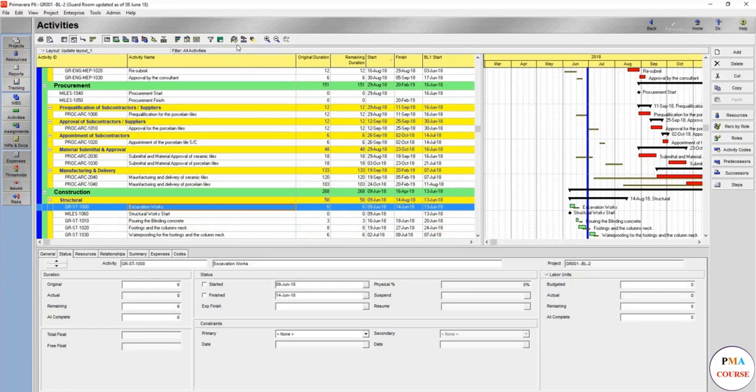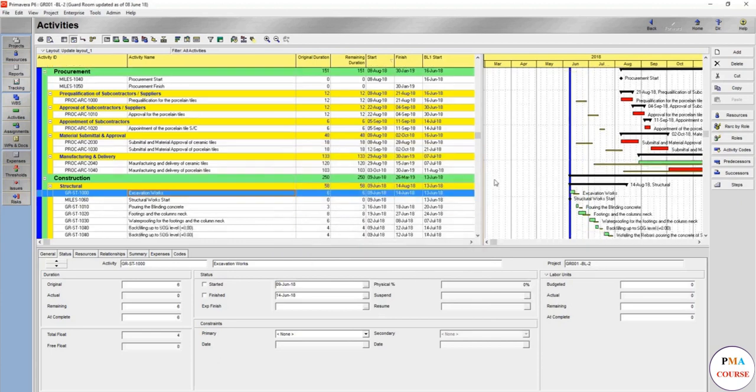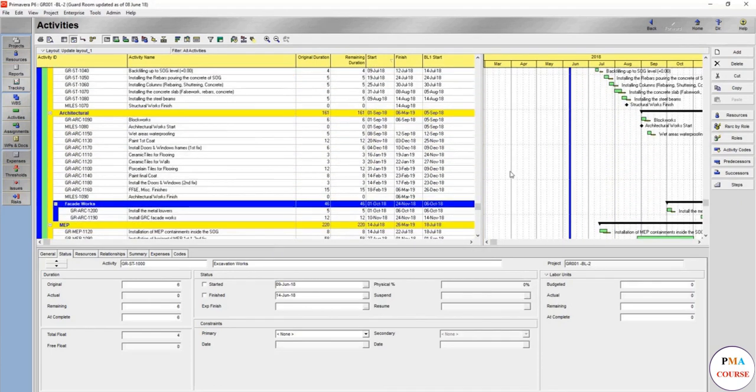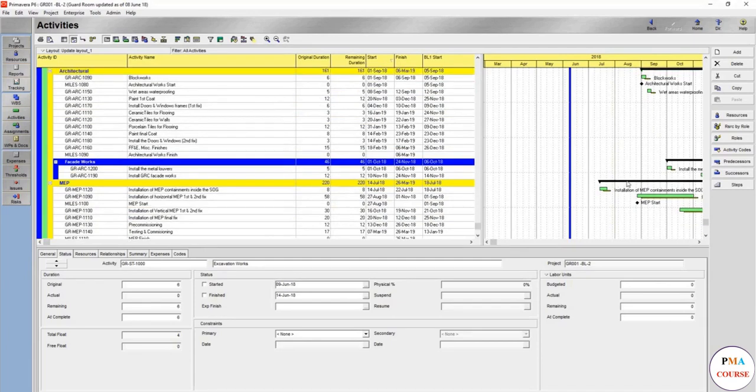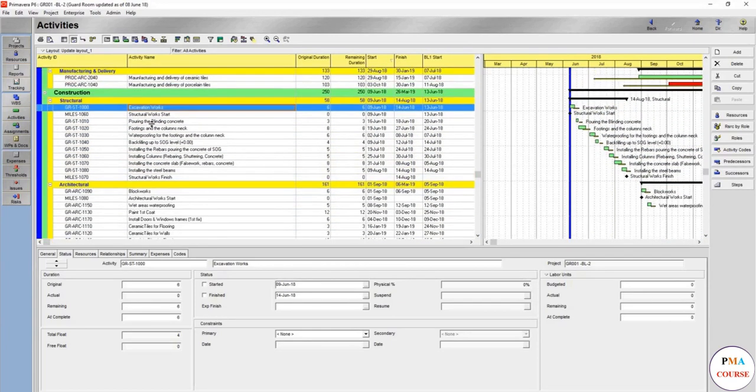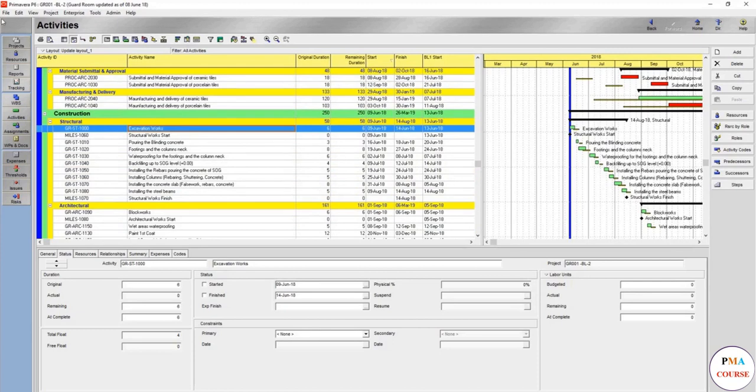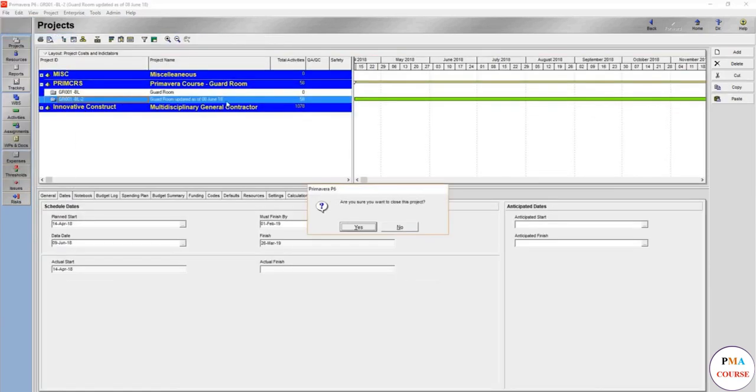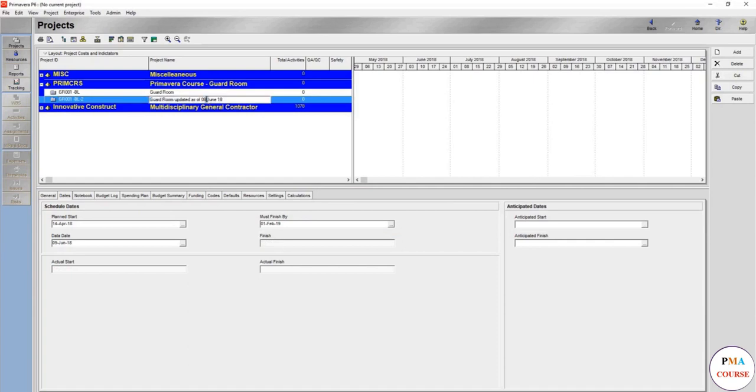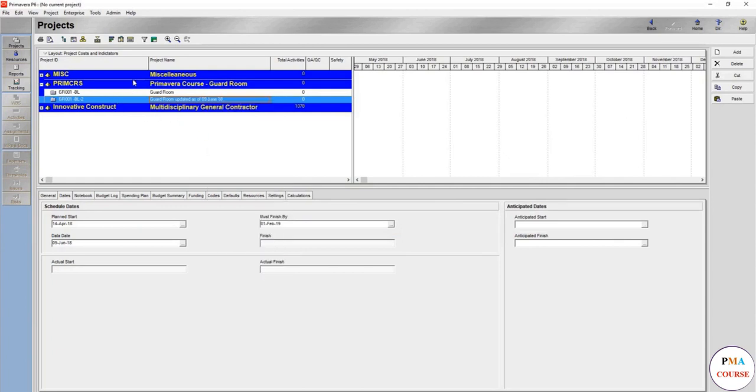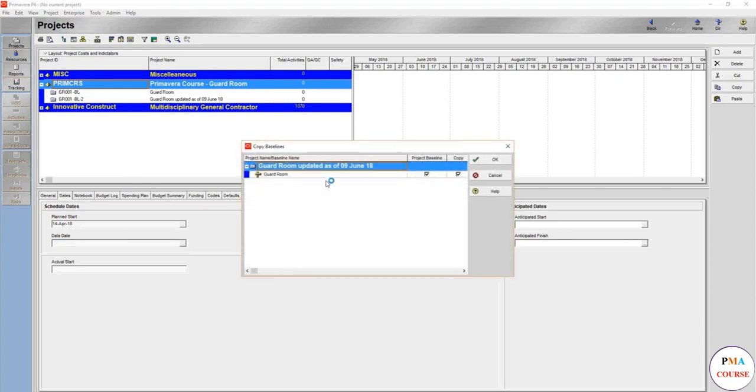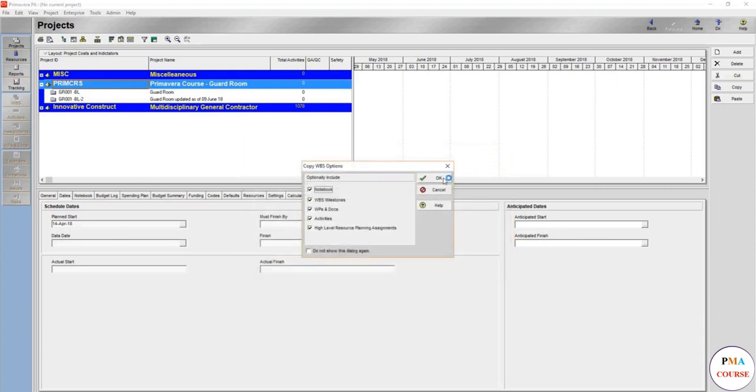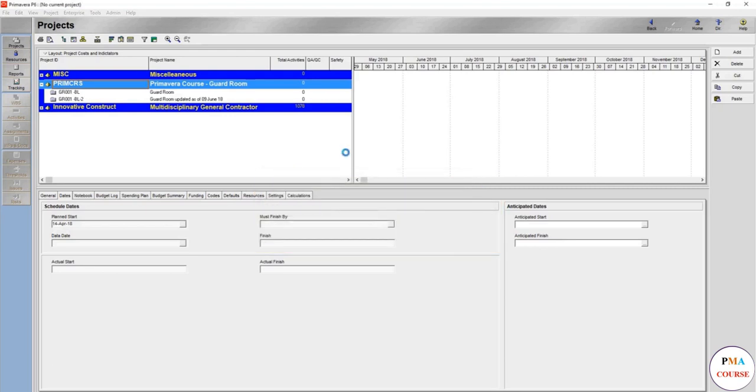So what do you think the update is? What else is remaining to see? Do you think we have covered each and everything? Always make sure how your project goes and the main milestone. That's simply how you update with the baseline. When you want to take a copy, make sure that you close all again. First let's change this one to 9 June. When you copy, make sure to take the baseline with you. You can assign here, check this one, and take it with you for your next update in order not to take the baseline another copy.